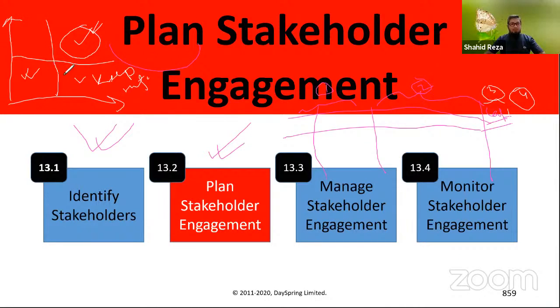All right. So we have talked about these strategies. Strategies mean a broad category of strategy, right? So we have to keep informed the stakeholders in this quadrant. In this column, we will write the strategies, whether we need to keep these stakeholders informed or manage them closely. And in the fourth column, we have to write down all the action plans to meet those strategies, to involve those stakeholders.